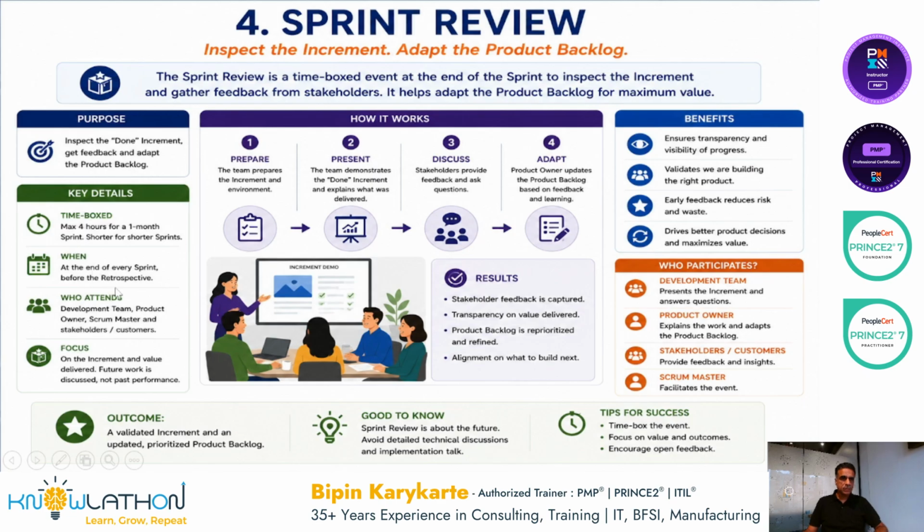It happens at the end of every sprint, before the retrospective. Who attends? Development team, product owner, scrum master, and stakeholders and customers. So these are the additional audience now. Focus is on the increment and value delivered. Future work is discussed and not the past performance. We identify whether it is working or not working. If there are any additional features, feedbacks, etc., that need to be taken up, that is what is discussed.